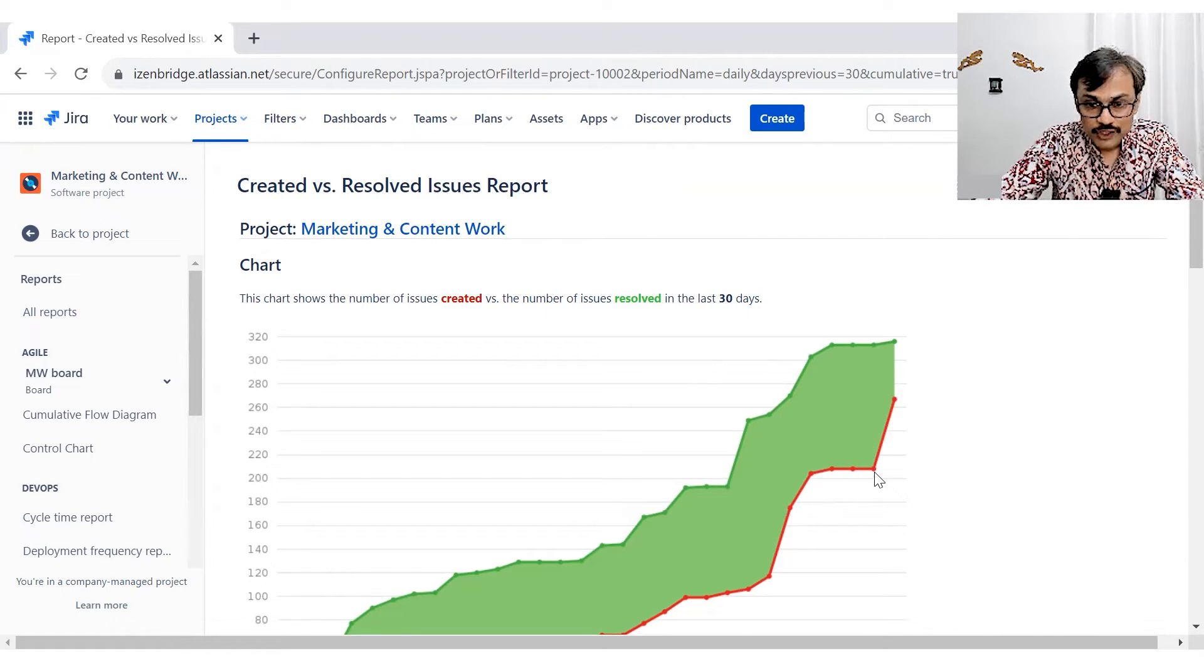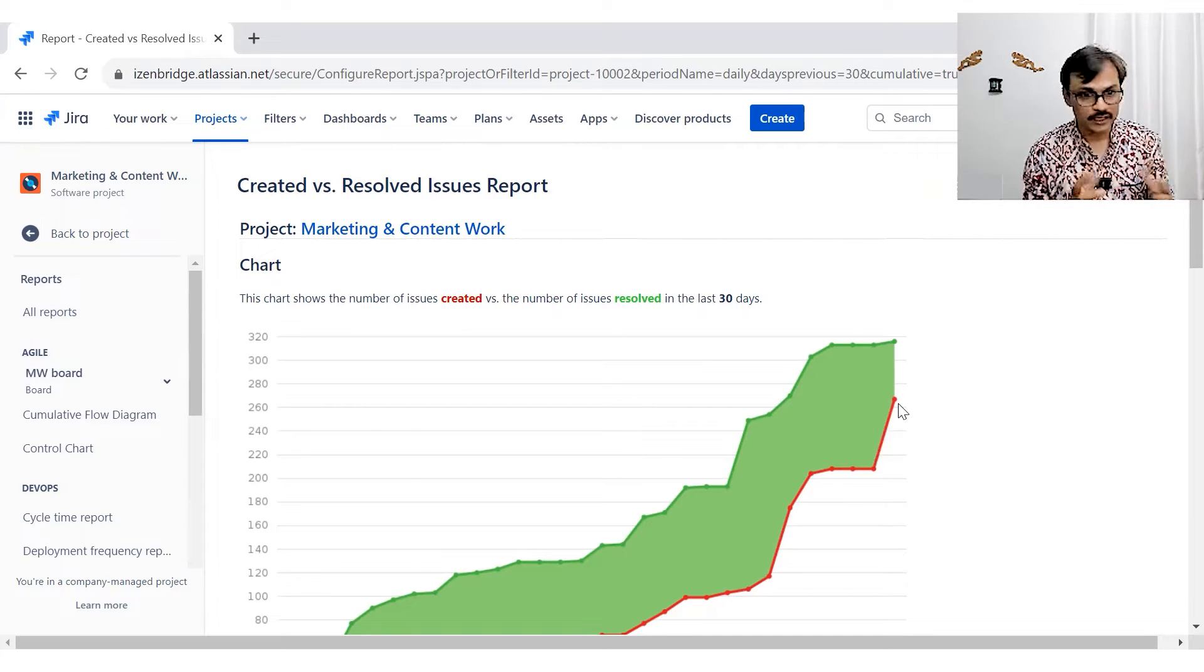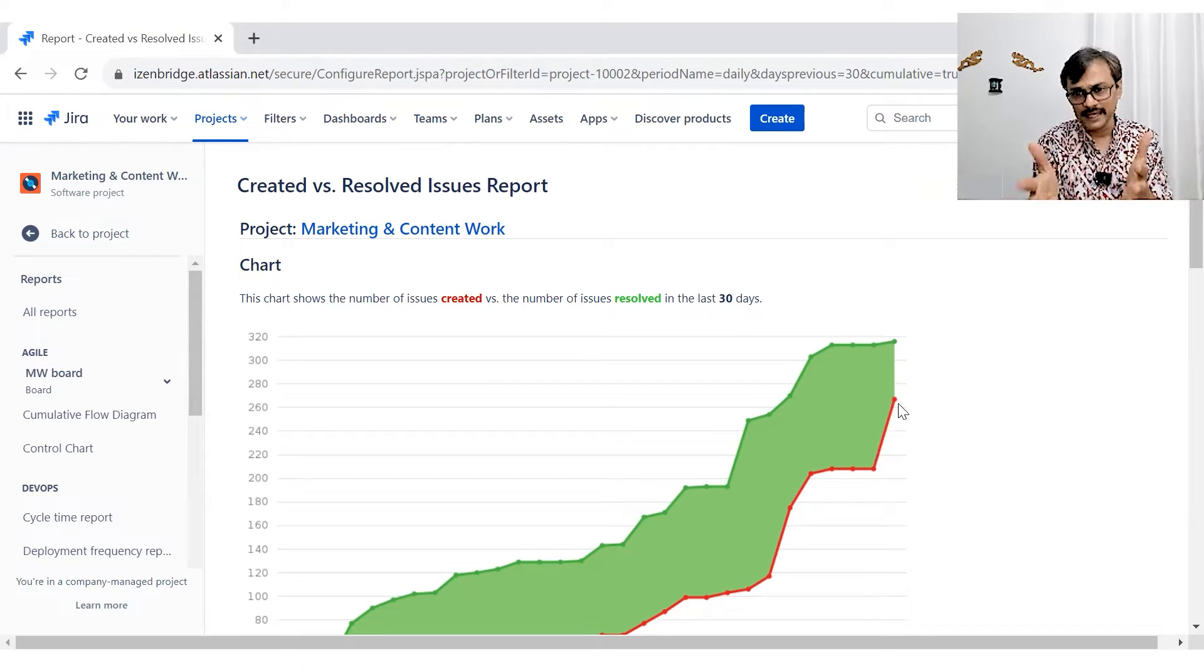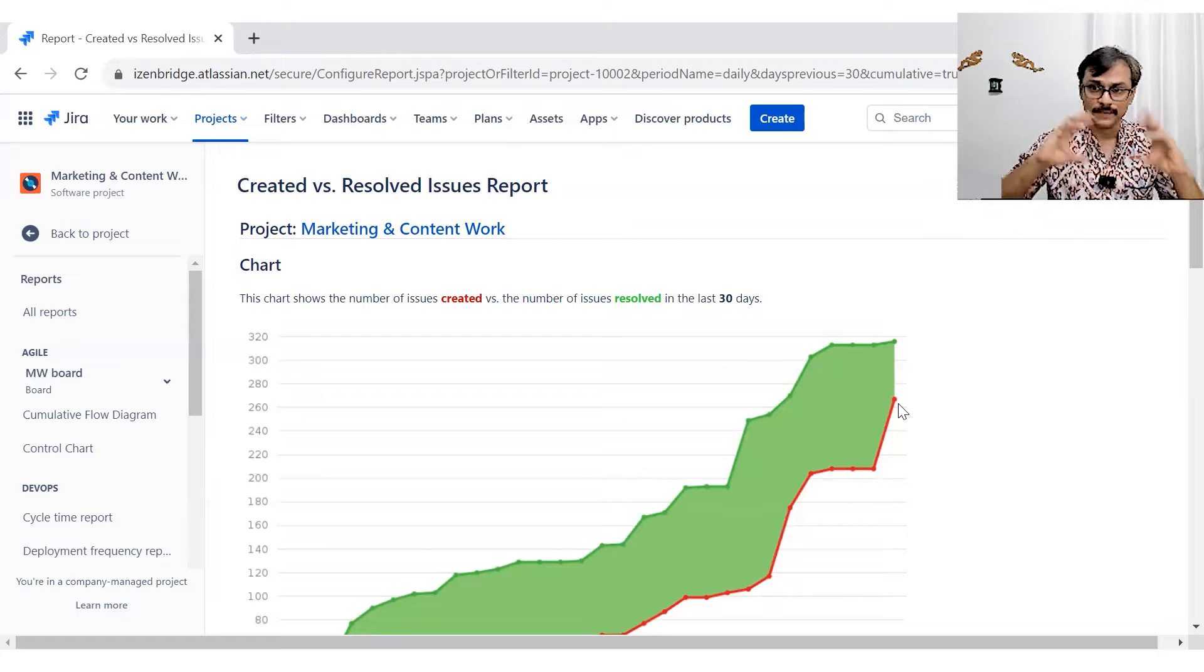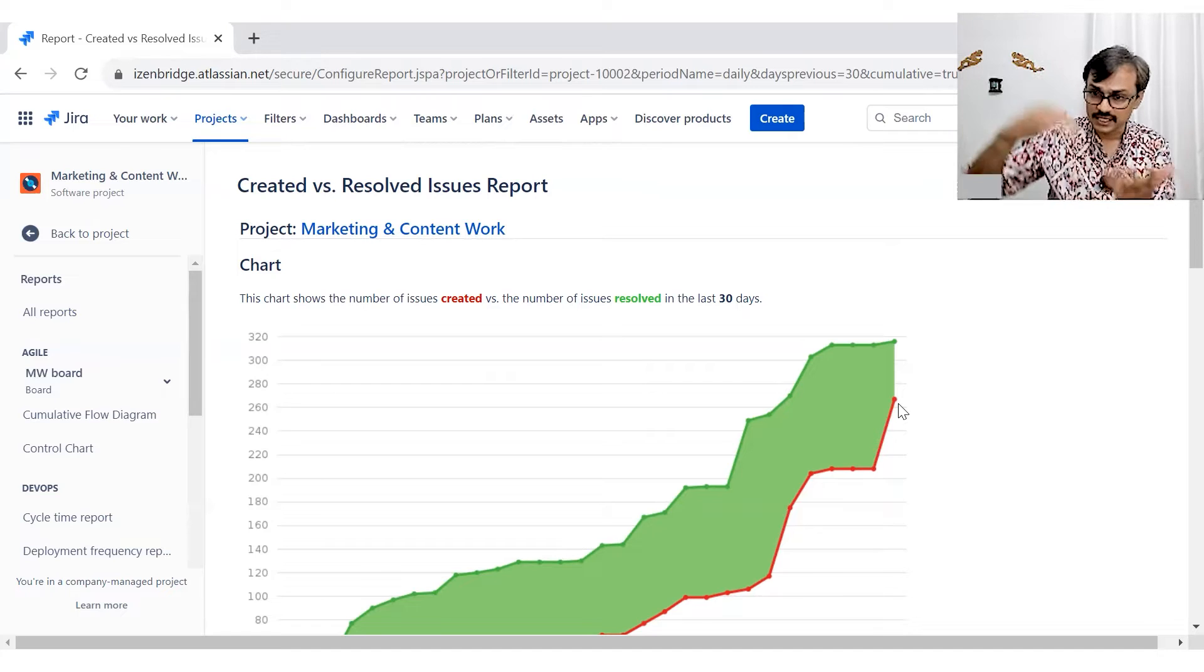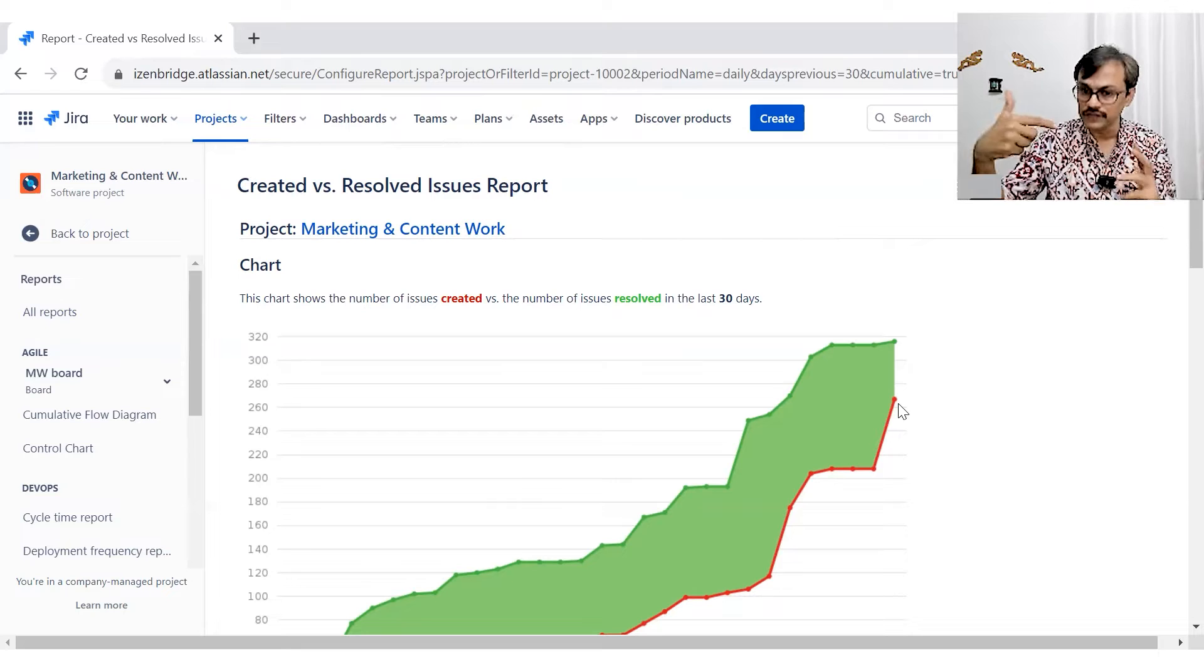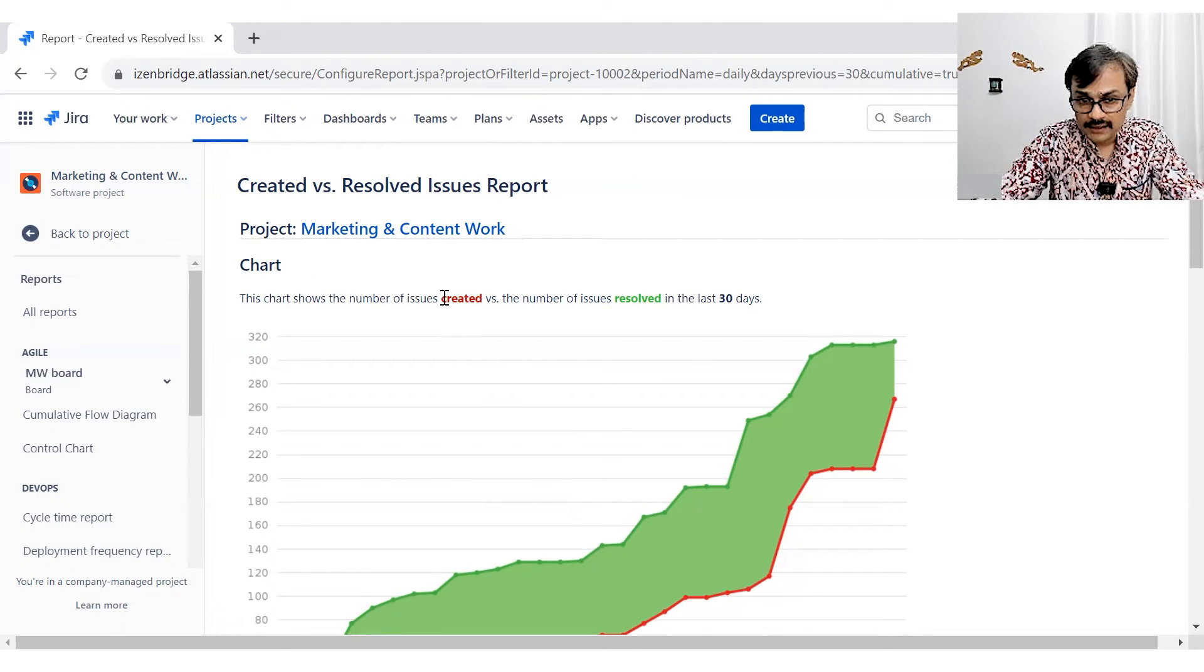I can also see that something has happened in the last one day. A lot of issues got created here. Maybe if you are running a production support, you may get worried. What happened? Why so many issues got created? In my data, I understand because it's a change of a week. We have some kind of fixed events. When we plan those events, we get a lot of issues get created because we need to take care of them. And that's why those tasks and issues got created. So for me, it's pretty normal.